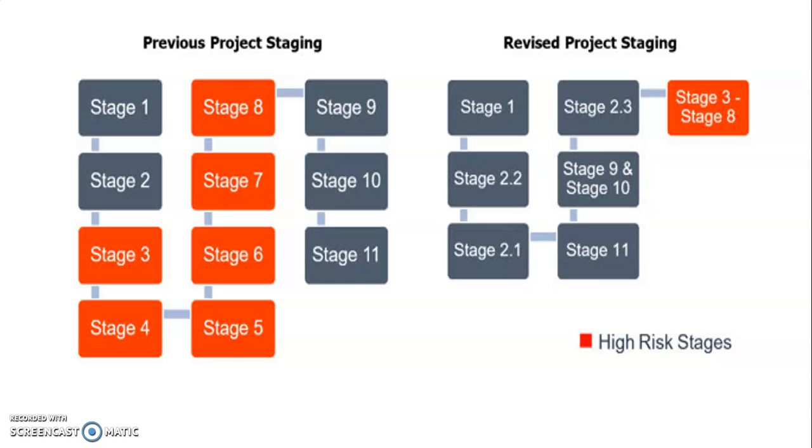Then the next stage comes the organizational policy, or we can call it operational policies. Here the hospital should have policies, departmental and interrelated activities, departmental and hospital policies, development of control plans, budget cost, and continuous informal decisions with owners. The third stage is schedules of accommodation, sketches, and final cost estimates. You have to schedule the accommodation, do sketch drawings, and have equipment schedules, component estimates, then cost revenue, staffing estimates, and then a final cost approval.